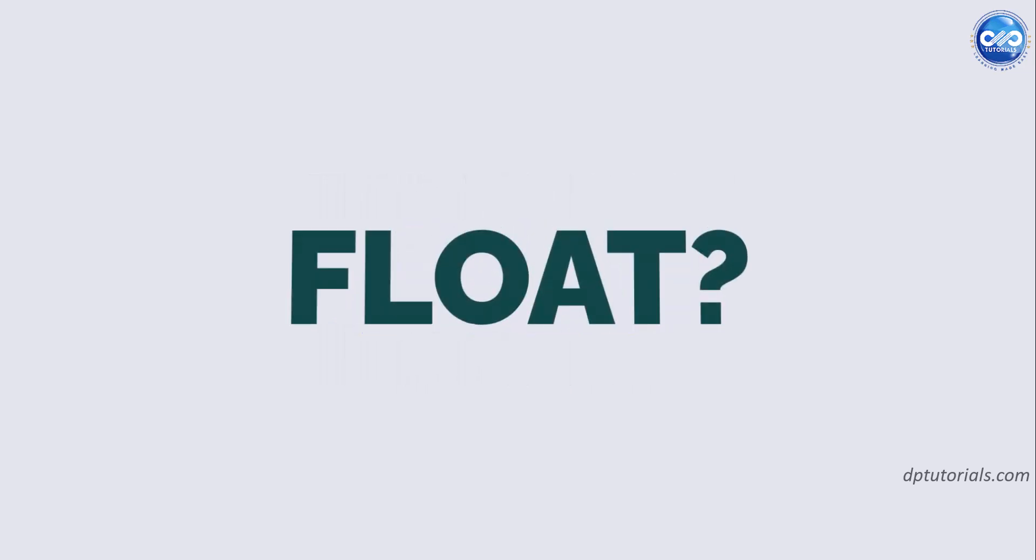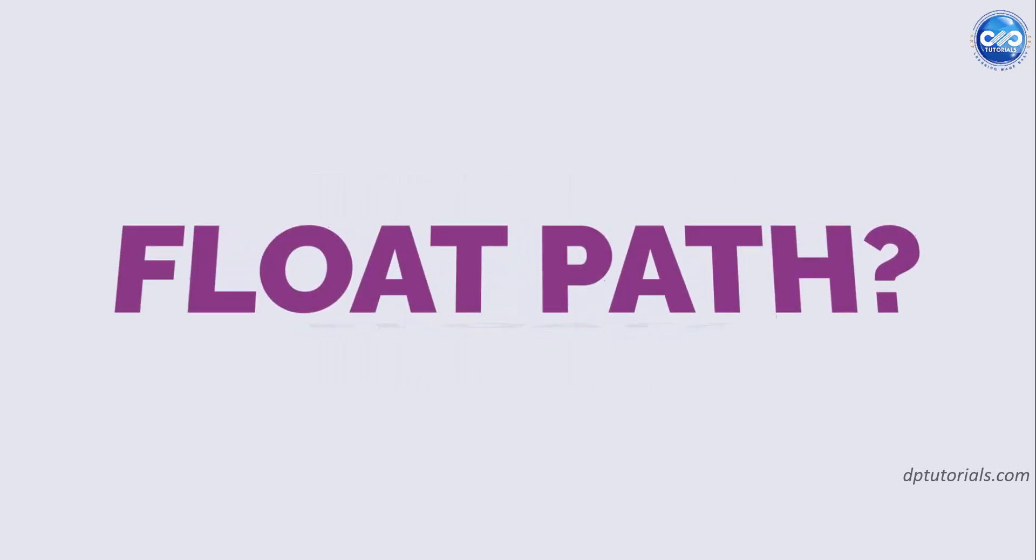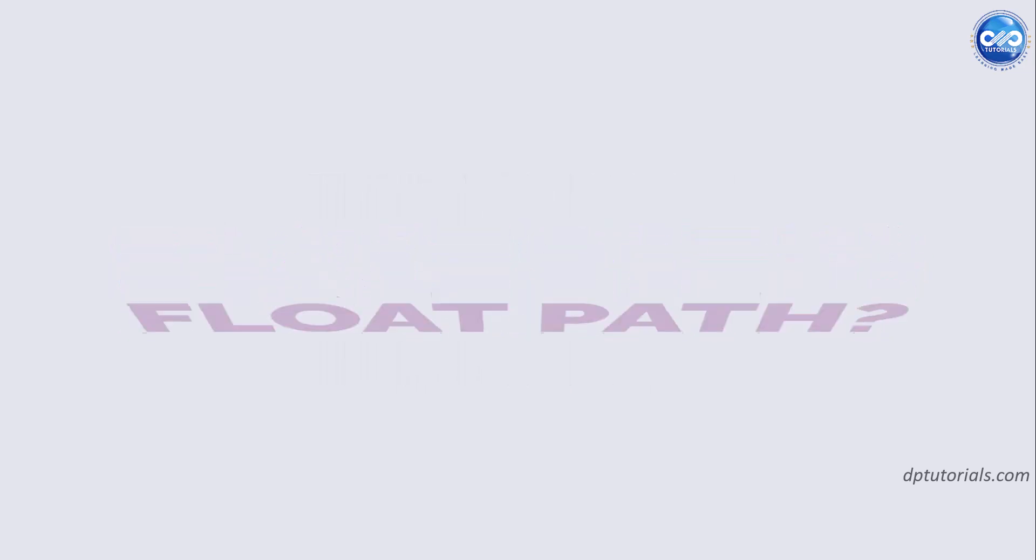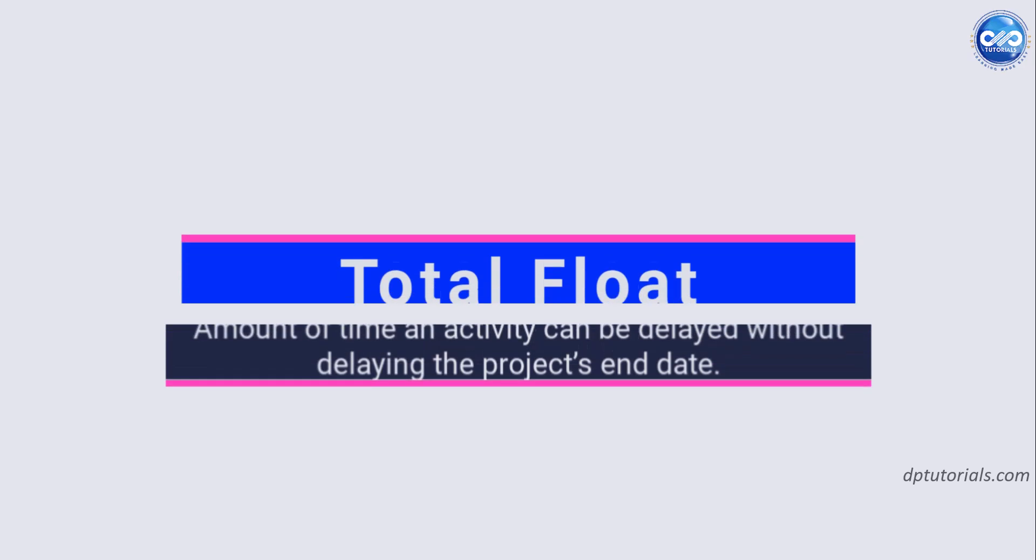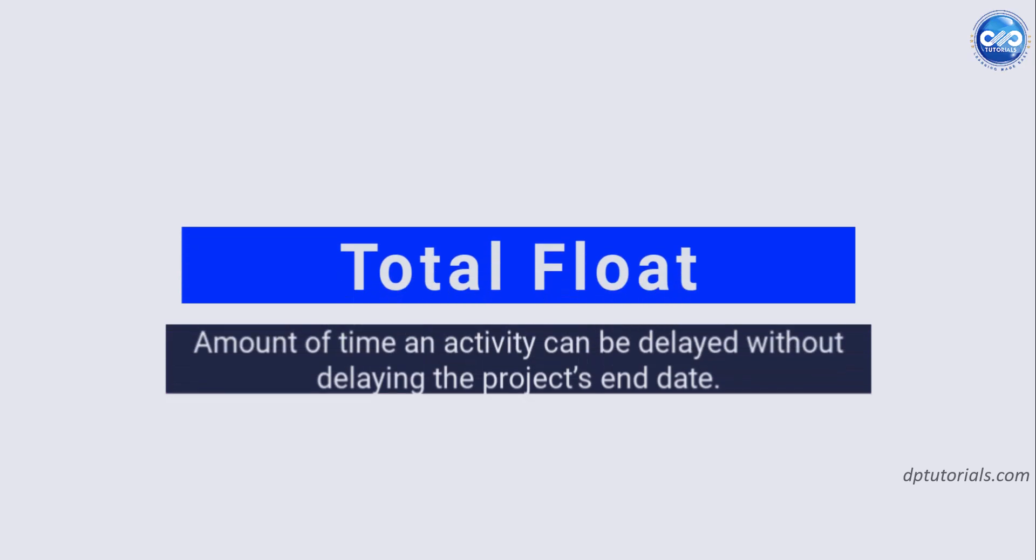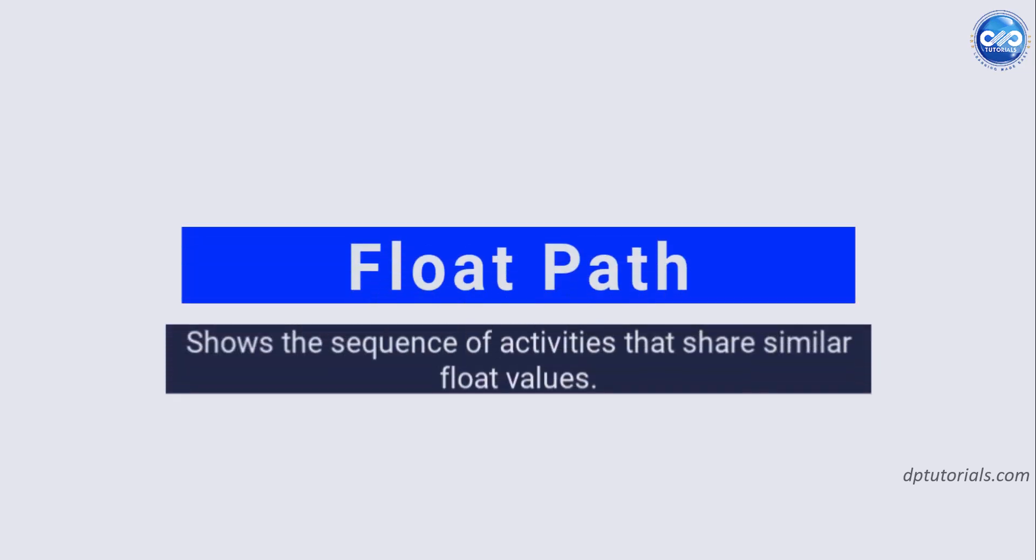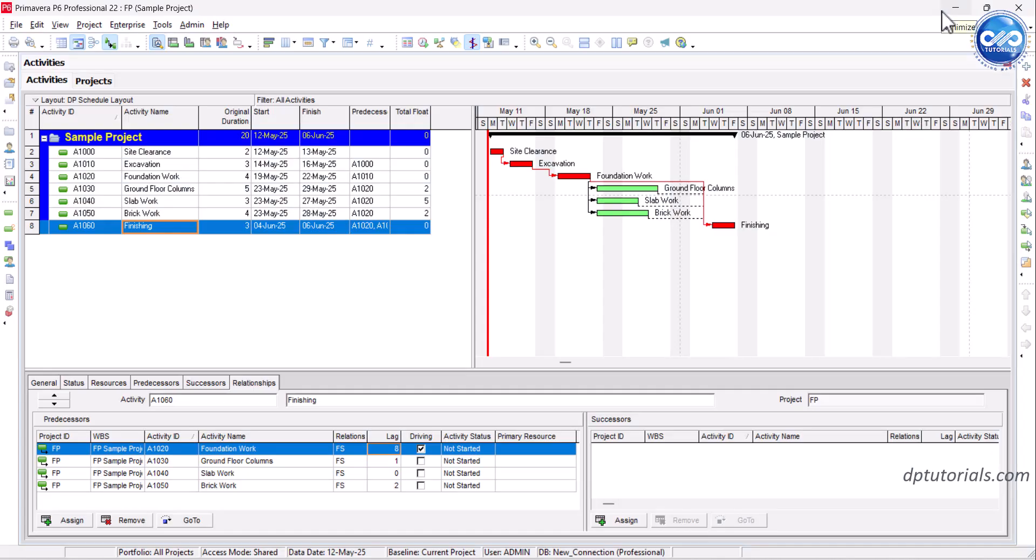First, let's understand what float and float path mean. Total float is the amount of time an activity can be delayed without delaying the project's end date. Float path shows the sequence of activities that share similar float values. This helps you understand not just the critical path but also near critical paths that might soon become critical if delays continue.